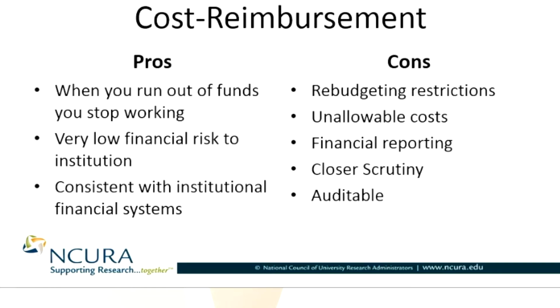The downside of cost reimbursement is that you get rebudgeting restrictions. There's a concept of unallowable costs. There's required financial reporting, closer scrutiny on whether you're doing the work, and you have audit requirements that you wouldn't have under a fixed price contract.